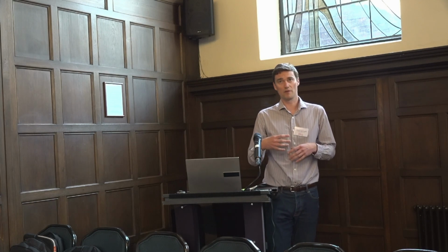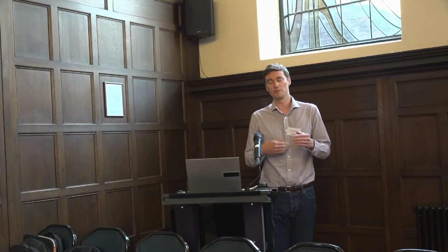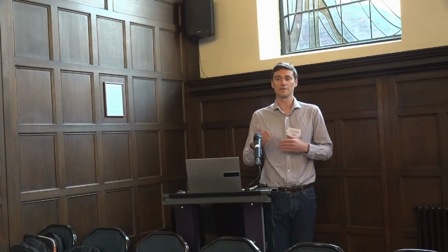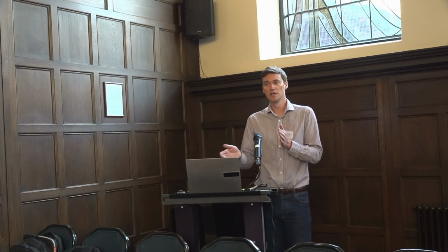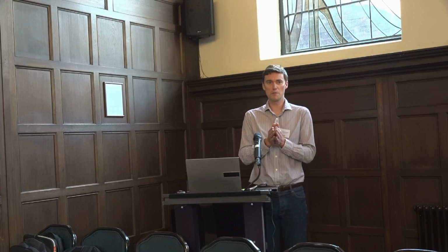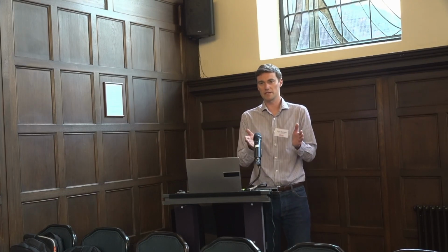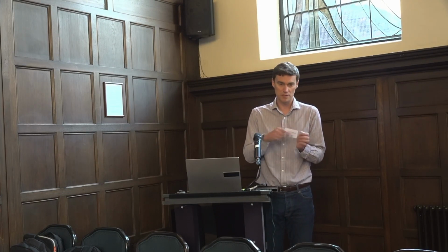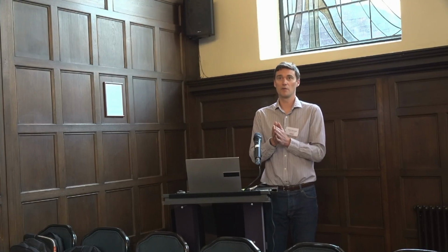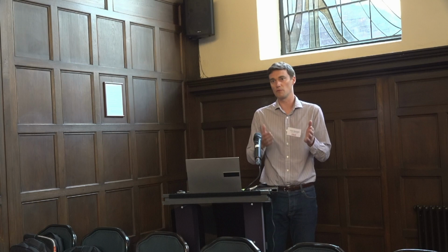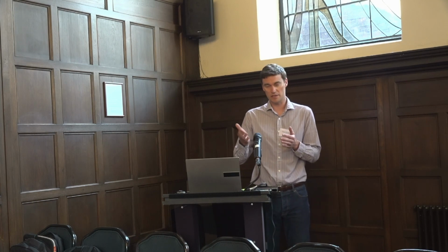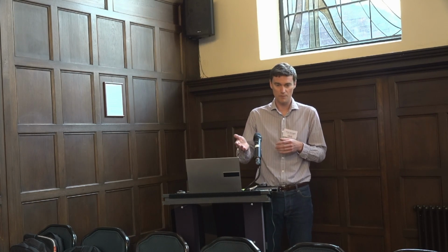The separate bit is about the way that the tool is structured, which, as Fraser's rightly pointed out, is all in the methodology: at different points of the project lifetime, we will have different forms of data at different levels of accuracy. At the tender stage, for example, we may only have estimated in pounds how much we're likely to spend on any particular item, whether that be excavation or a welfare unit.